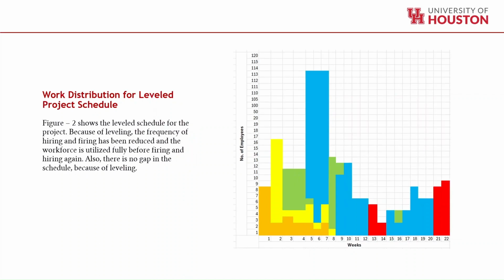So this is what my team came up with when we leveled the whole schedule. We streamlined the whole schedule so that for one system, there will be continuous use of the personnel, so that there won't be too much hiring and firing that needs to be done.